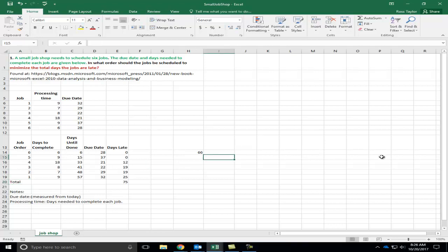We made things worse. It's 75 days late. What if we did 1, 5, 3, 2, 4, 6? We're at 67. We're still worse. So we could keep going through and trying a few million combinations to figure out what the best one is.